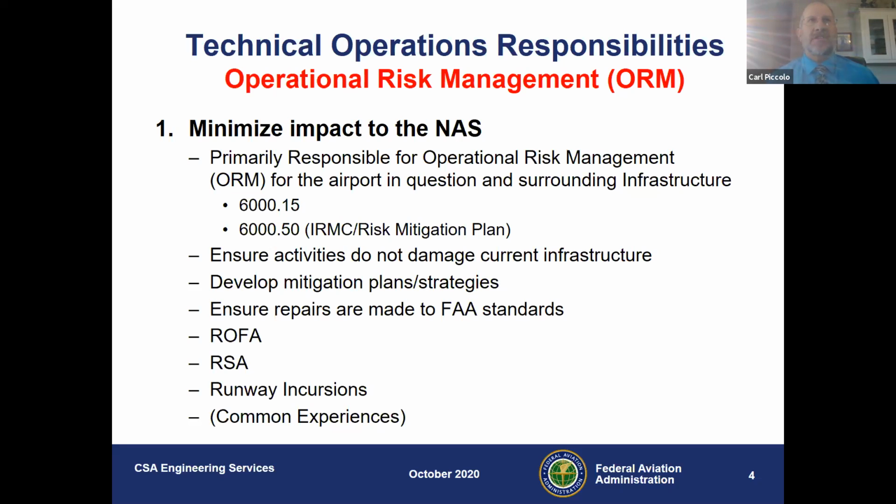For instance, a good example, if you're burying a fuel line all the way across your airport, you may encounter several of our facilities or our buried infrastructure. We will work on mitigation plans to make sure that when you're in close proximity to those facilities, in the event of an unscheduled interruption or damage to the facility, we can recover quickly and continue to provide the services to the flying public.